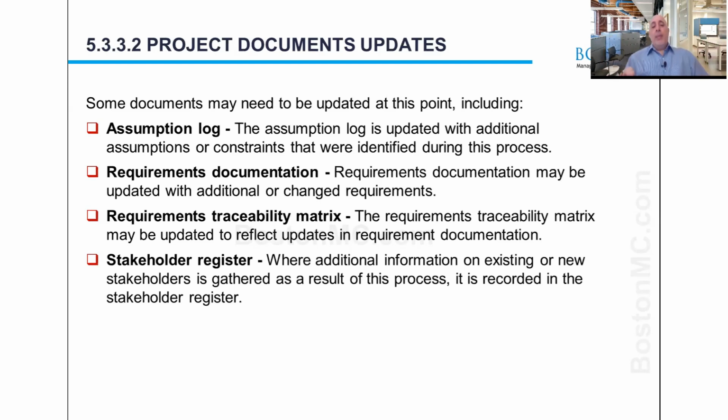Stakeholder register, that may need to be updated because as part of you getting the final design or final scope for your project, you may have to interact with additional new stakeholders, and so you have to update that in there. Any assumptions that have been made, I know you put them on the scope statement, you should update your assumption log, the one that you have prepared previously. And this takes us to the end of the define scope process.